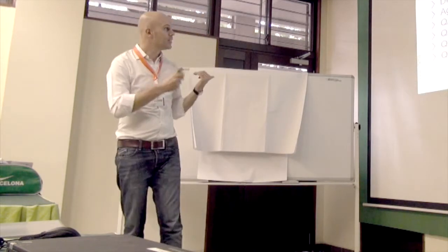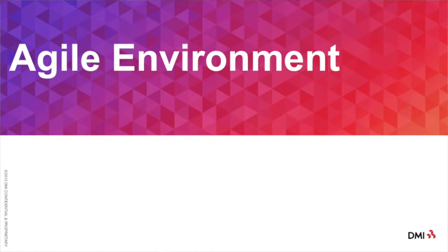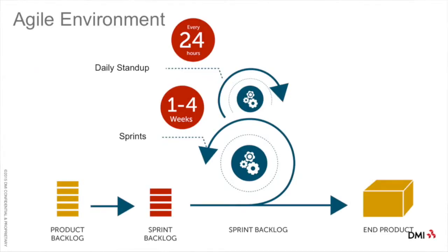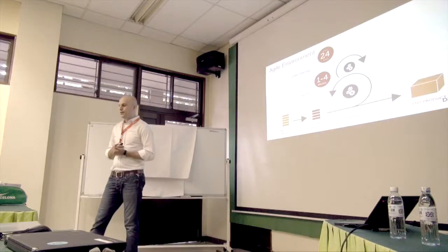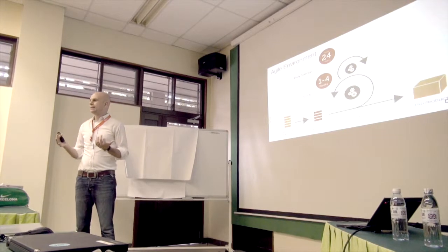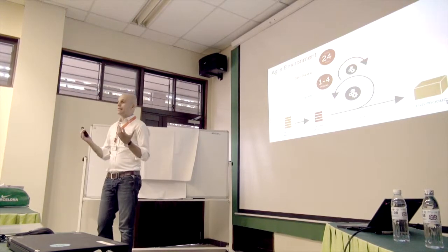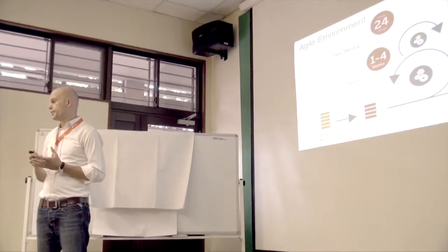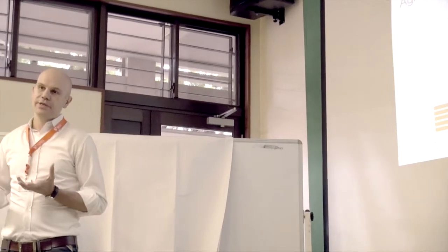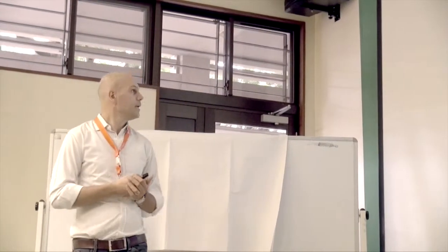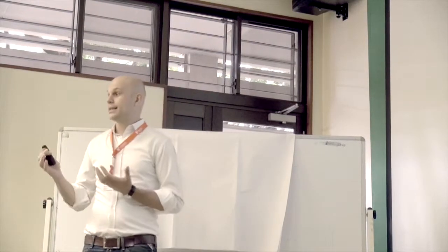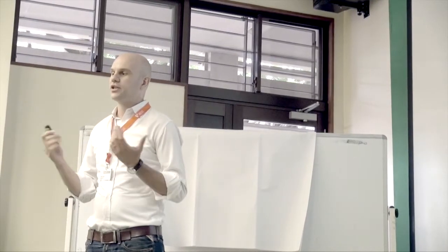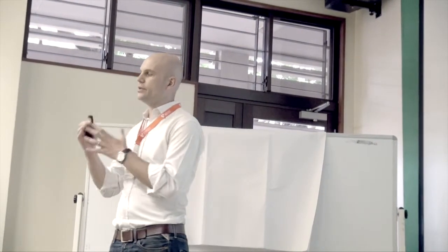And then we moved to Agile in Golden Gecko. So you've seen this maybe a couple of times before. We have the normal stand-ups every day. We meet first in the morning, the test leads. I'm talking about QA. Test leads are organizing the projects from a QA perspective: who is supposed to test on it, how many resources, who's the main tester, and so on. And we're joining as well the project stand-ups, which means that the project owner calls for a stand-up as well. So we actually have two stand-ups, one for QA related and one that's the whole project.